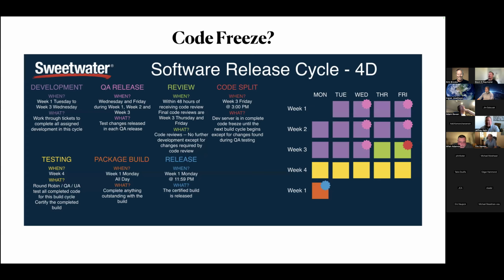And this was our release cycle prior to project mode and CI/CD. And this is a virtual month broken up into weeks. And you can see out of the month, only the days in purple were available for developers to actually write code. The rest of the time was devoted to processes, just supporting the ability to take all the code that was written in those days, test it, document it, and get it ready for deployment.